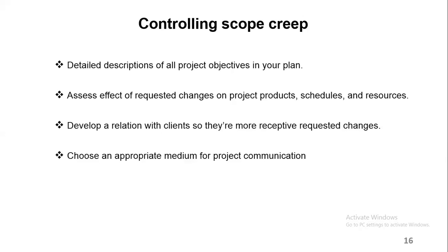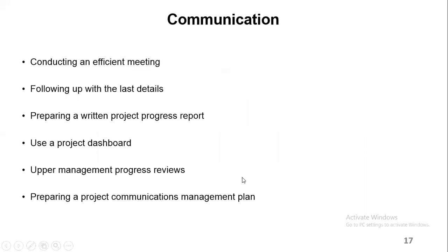Because remember, as a project engineer or project manager, sometimes you'll be required to have a meeting with the guys who are actually doing the job, as agreed. But sometimes you might also be required to have another meeting, updating top management, for example. With top management, you can update them once every week, while the guys who are actually doing the job, you can update them every 2 days, something like that. But it depends on the level of your project. That's why communication is very important.